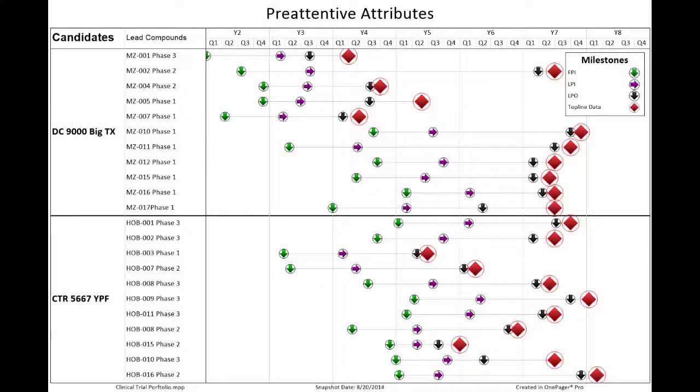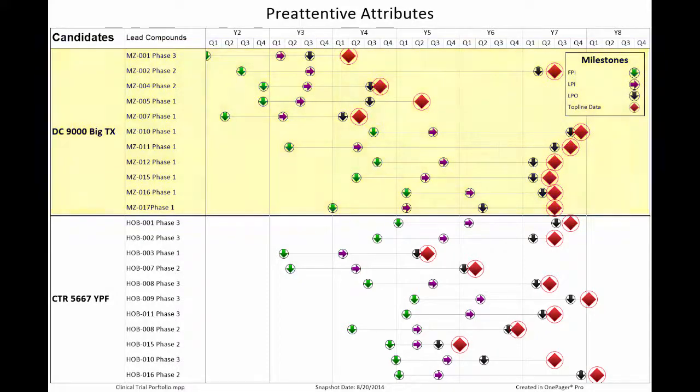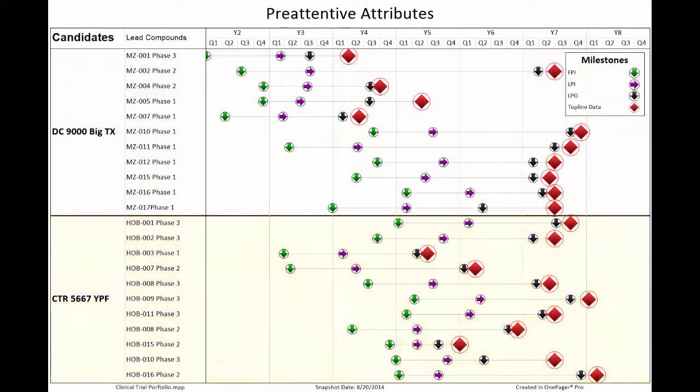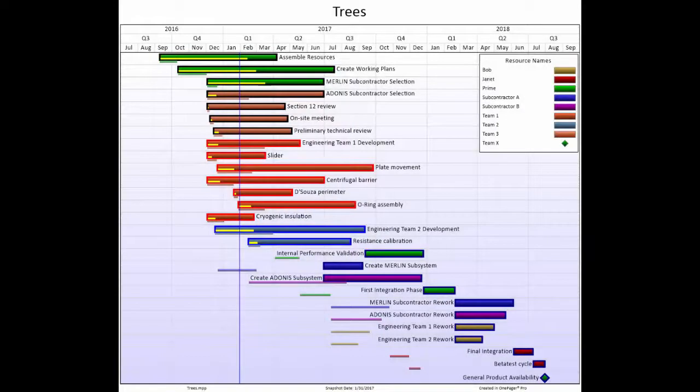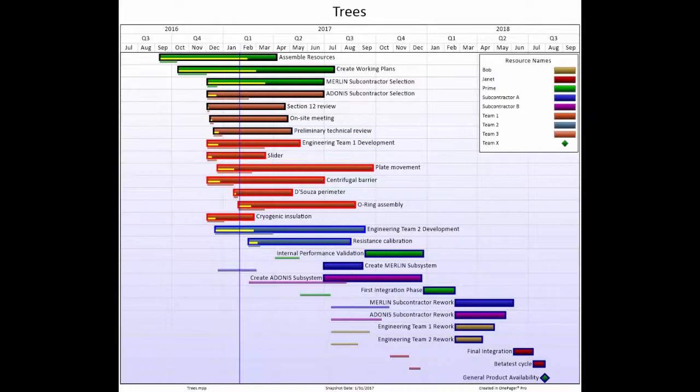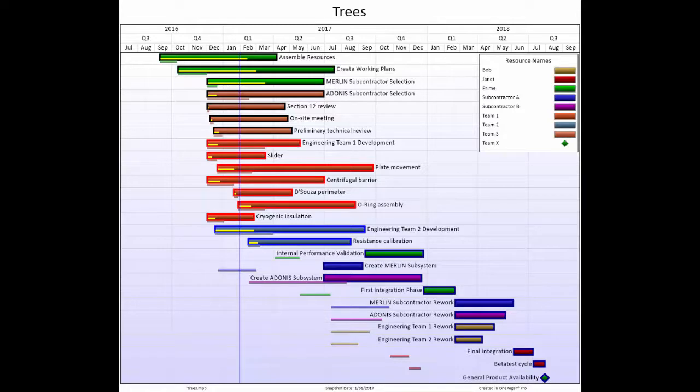Spatial, vertical grouping using swim lanes in a Gantt chart is the most obvious attribute and one that should be included at the top of the hierarchy. One word of caution though, that using too many attributes or having too many unique values of a single attribute to illustrate many different data points will result in our brain wanting to consume the visual as an aggregate. Meaning it will be very difficult for us to extract each subset of data because there is too much diversity in front of us to absorb each group individually.